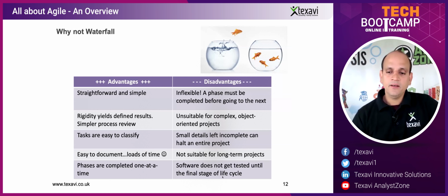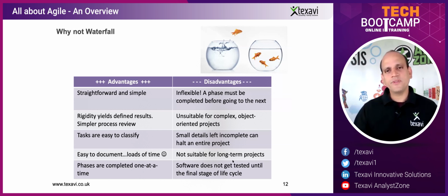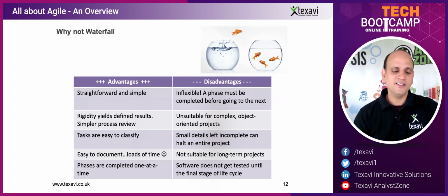Well, another problem is what it gives us with the testing. We talked about it. You do not do the testing till the development is done, which is about 3/4 of the project. That's when you do the testing, big bang, you come up with all the defects. Then it takes a lot of time to fix those defects. It takes another 1.5 years for you to fix those defects. So again, definitely a recipe for